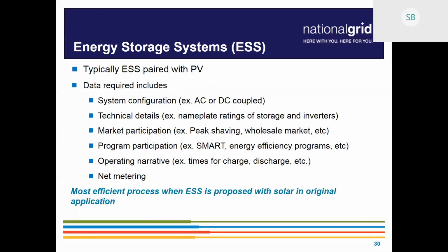And again, the best way to do it, the most efficient way, is if we know the project's going to include storage right off the bat. So if you have a PV site and then it goes through a certain amount of study and then we end up adding storage after the fact, that's a little more difficult to incorporate and kind of backtrack some of the analysis than if we know up front. So if you do know off the bat it's going to be there, please include it.